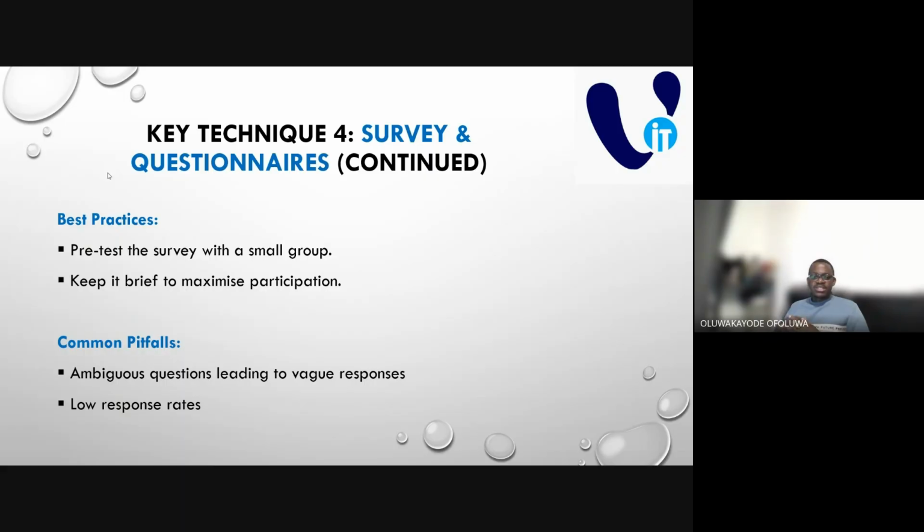What are the best practices for surveys and questionnaires? Number one, you have to pre-test the survey with a small group to see how it performs, to see if there's any error in it, or if there's any mix-up around it. Then you have to keep it as brief as possible to maximize participation.